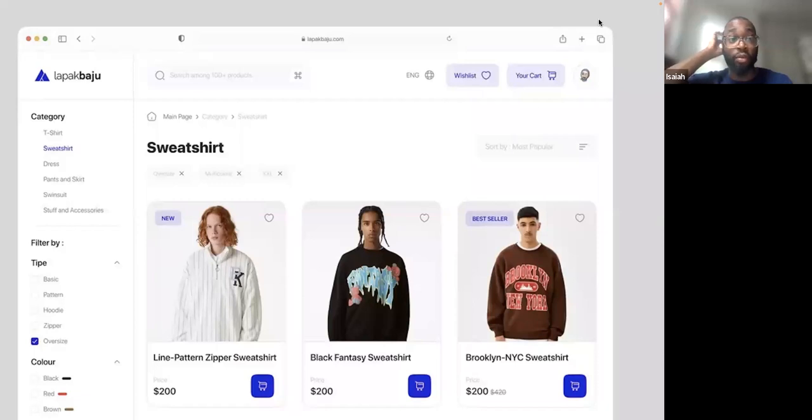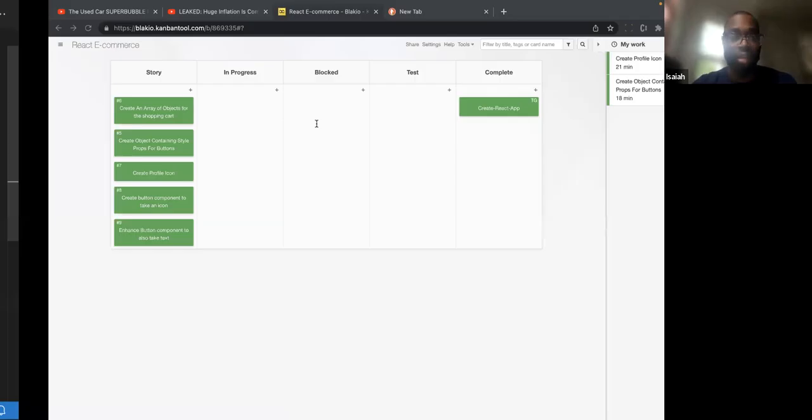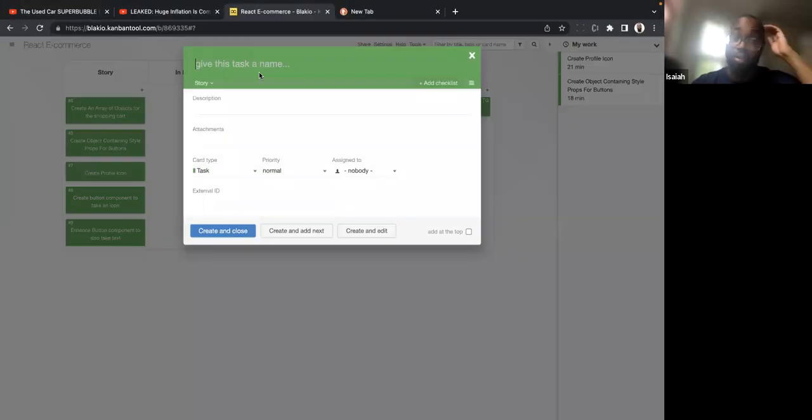So yeah, that's what we need, because we need to be able to see these components on the screen. So the first one is, let's create the layout. Everything's going to depend on this one, but let's not put the dependencies like that, because it's going to be too many tickets depending on one ticket. We'll just know to do this one first.